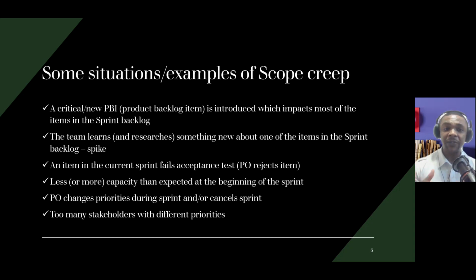When the PO changes priorities during the sprint, or when the PO cancels the sprint, because the PO is empowered to cancel the sprint, in that situation, if it happens, it could also contribute towards scope creeping.